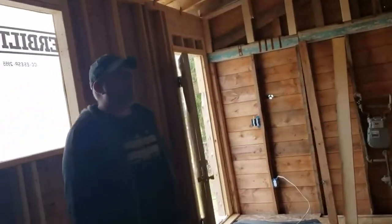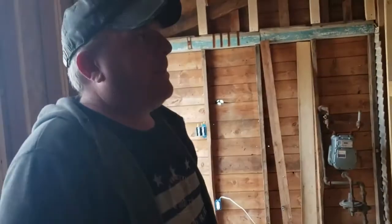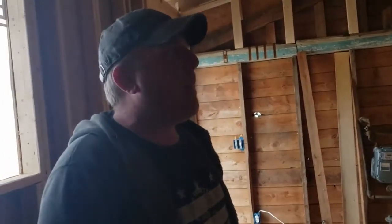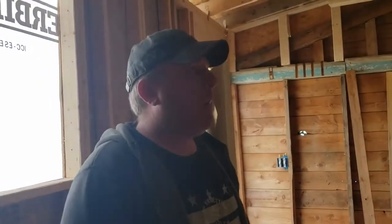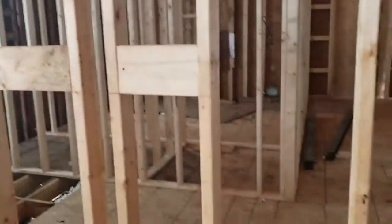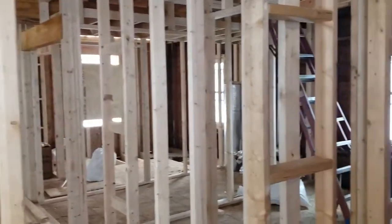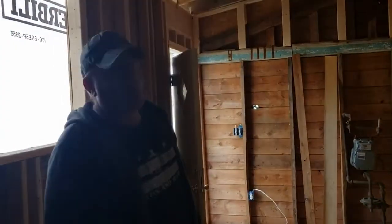My honest advice is, find a couple guys that you know that you're willing to work with. If they're afraid to show you the numbers, talk to somebody else. It starts with the numbers. And I'm still adjusting numbers. I have a spreadsheet, and it never changes. I'm always adjusting. Our initial plumber did not get this contract because he came in almost $3,000 above what we had budgeted, and that was based on his quote. He came back and said it was going to be about $3,000 more than he quoted.